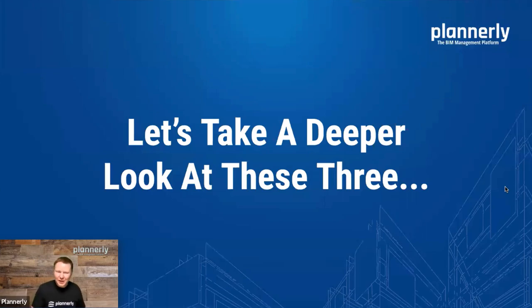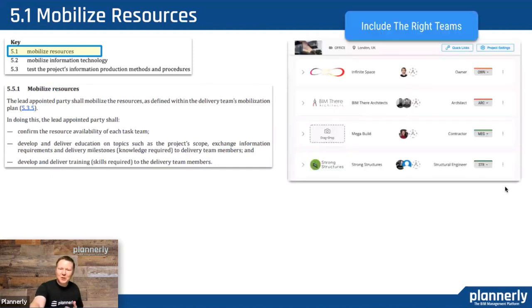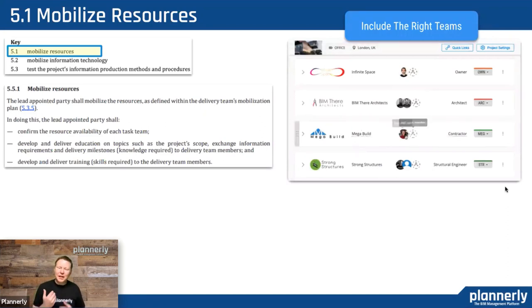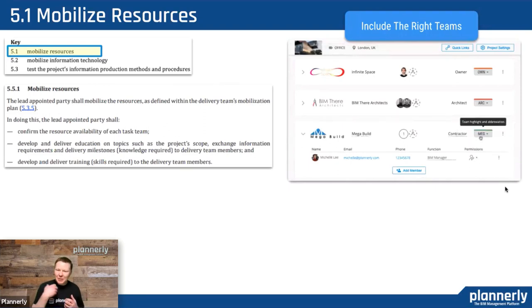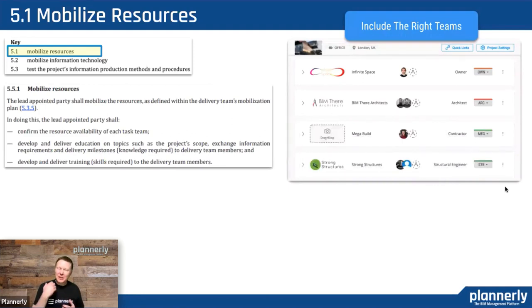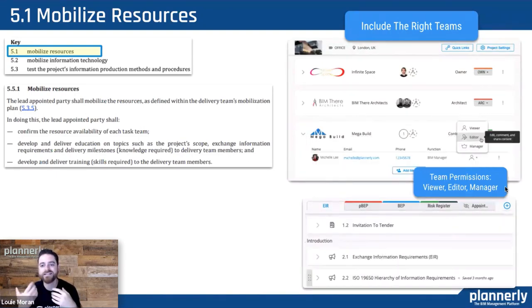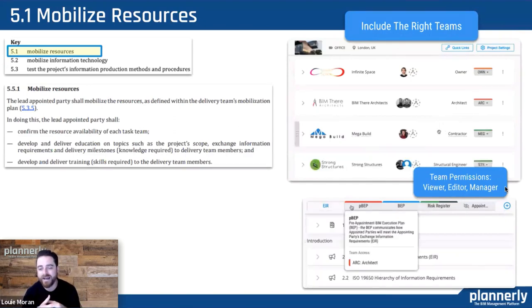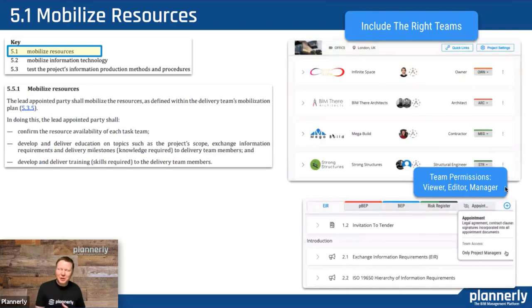There are three key steps: understanding what the resources are, their availability and whether they are trained; having a testing plan in place to make sure technology is ready; and making sure everyone understands the methods, procedures and how to execute on the project. The first one is mobilizing resources — understanding who is going to be available from each team and making sure they are added to the project. You can also define a logo for the team and profile images. We've seen a massive change when people see their own identity, creating a culture between a team that doesn't work together every day.